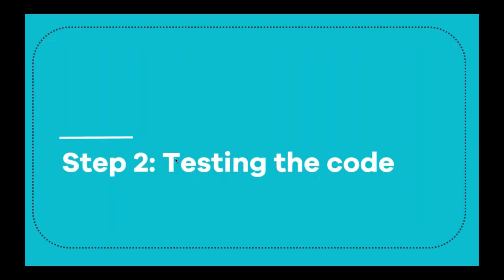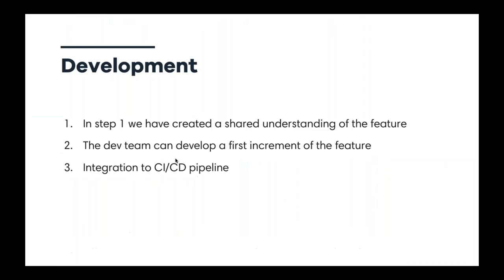It's time for the dev team to kick in and start implementing. Keep in mind that no single line of code has been written yet. This discussion to test the idea for a medium-complexity feature typically takes half an hour; for a more complex feature it can be an hour. So we're not talking about days of discussion — it's very quick and efficient.